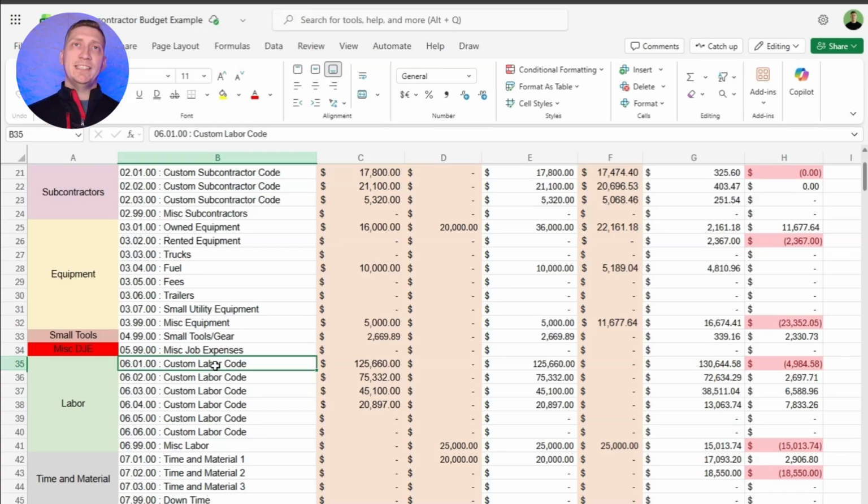The reason we do this is because you are basically making it manufacturing style, like an assembly line. Okay, we're trenching, and now we're doing base stone. Now we're putting in the pipe. Now we're covering it. Now we're backfilling. That's the process, right? And we can track which aspect of that we did wrong on this section, and how do we improve it on the next section? That's the exact same thing.